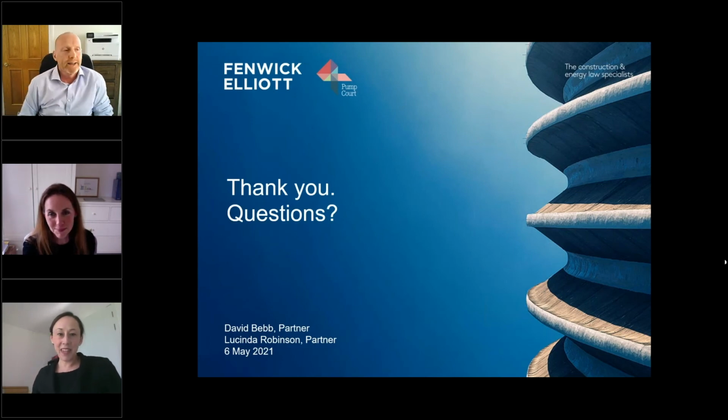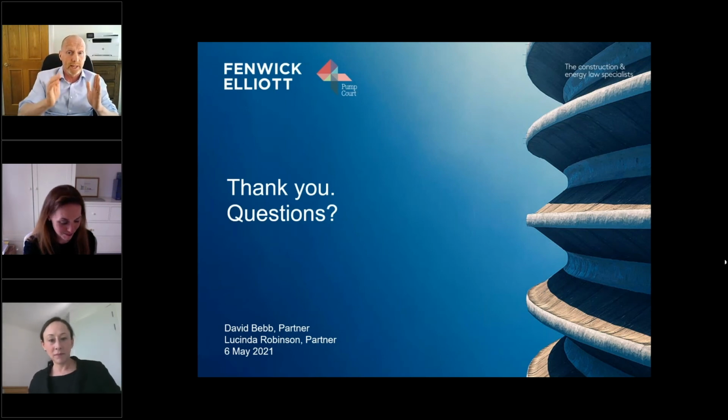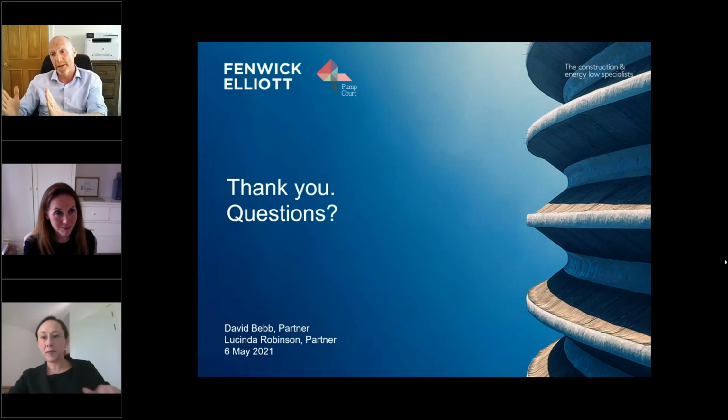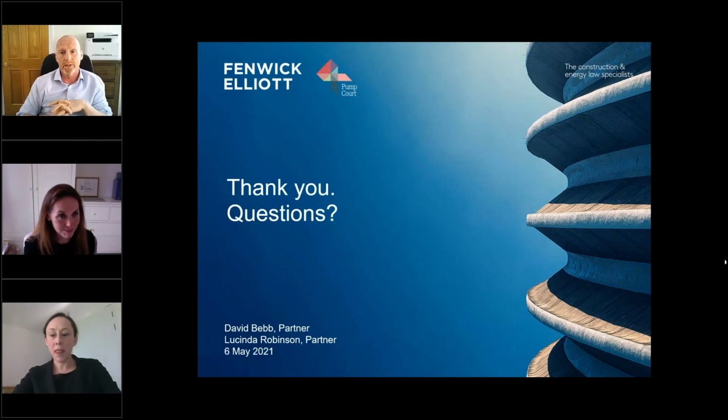Right. Can a contractor terminate a letter of intent? Right, back to basics. There's always a contract, remember. Let's assume that the letter of intent has ticked the boxes for contracts. It's done all the bits that Lucinda says it needs to do, okay? And let's assume it doesn't incorporate a standard form contract at the back. It's all going to turn on what its terms say. So unless there's something very clear in there that says the contractor can walk away for whatever reason, you're back to basic common law principles, okay? So certainly the contractor will not be able to walk away. There's no right to terminate.